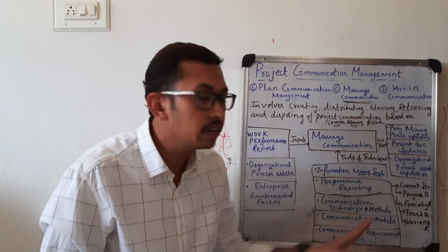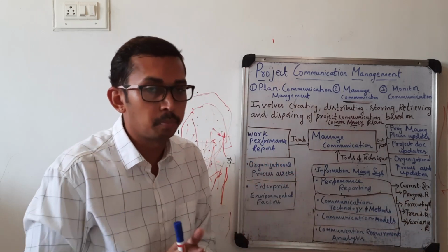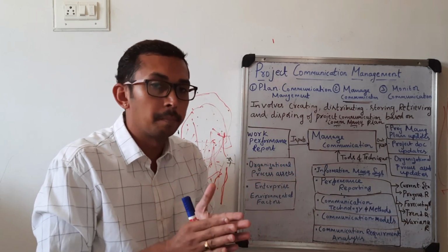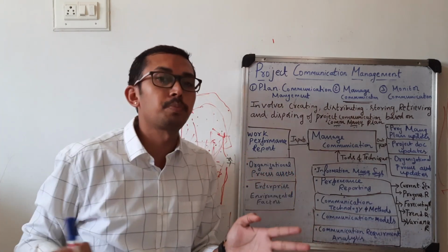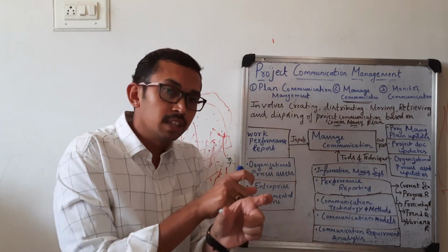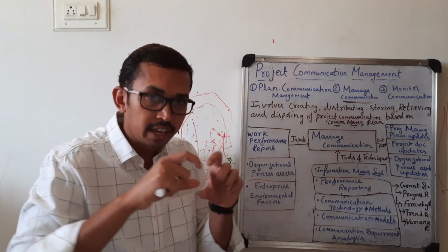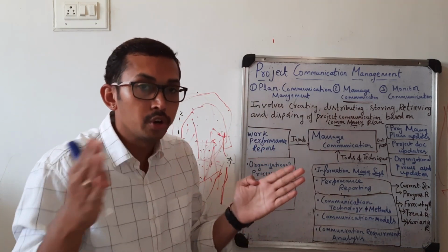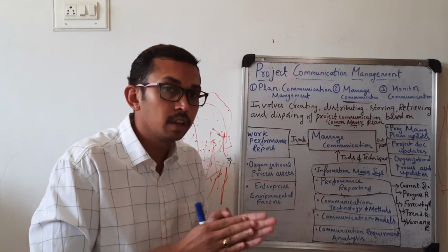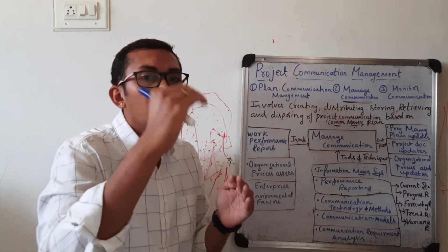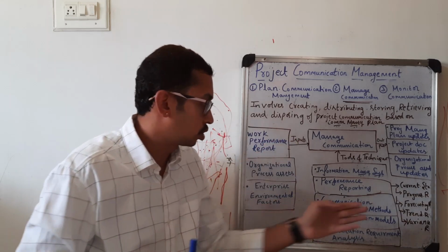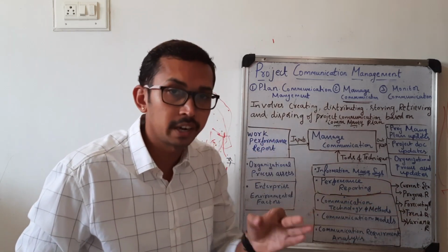Next one is a trend report. What is the meaning of trend report? We are going to compare the existing project with the previous already finished project within the same time duration. So then we are going to compare whether we are progressing, or we are improving, or we are declining. So that is what we are going to tell you about the trend report.